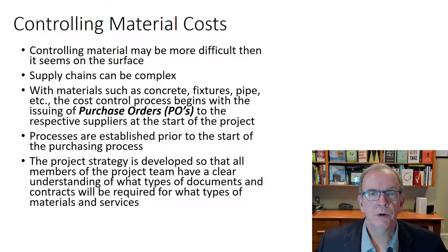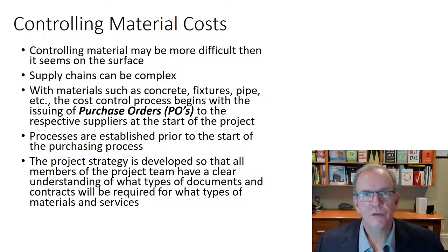And of course, when we purchase from somebody, we should be assigning a PO. So if you're going to a supplier, there's a purchase order number so that you know when you get the bills from that supplier. Because if you're a contractor, maybe you've got a contract with Central Fairbank Lumber. Well, in a month, you might have had 300 pickups or 300 deliveries of materials from them. Well, you'd want to know each delivery, have it assigned a purchase order so you know for which project that